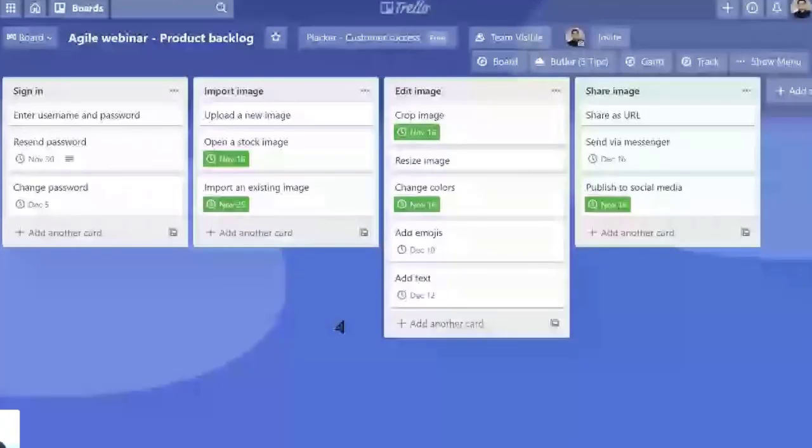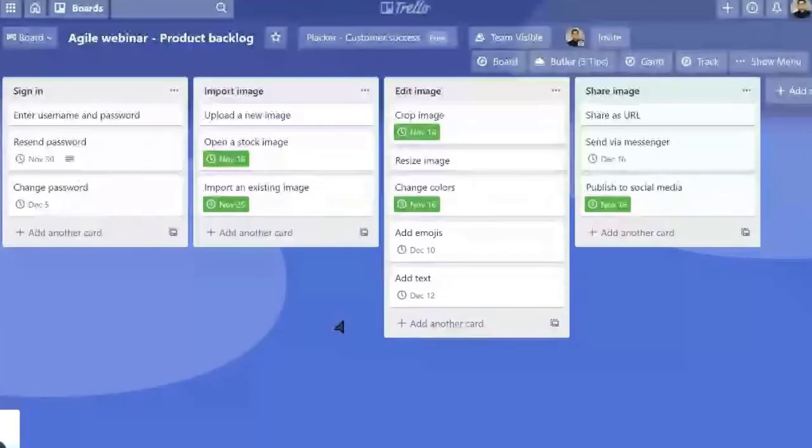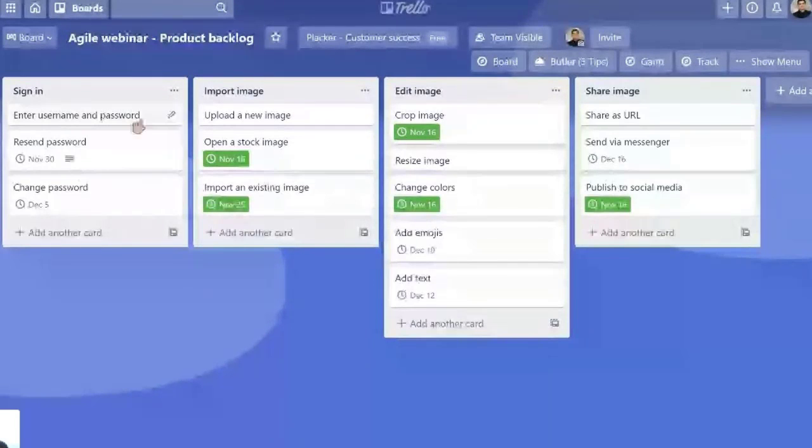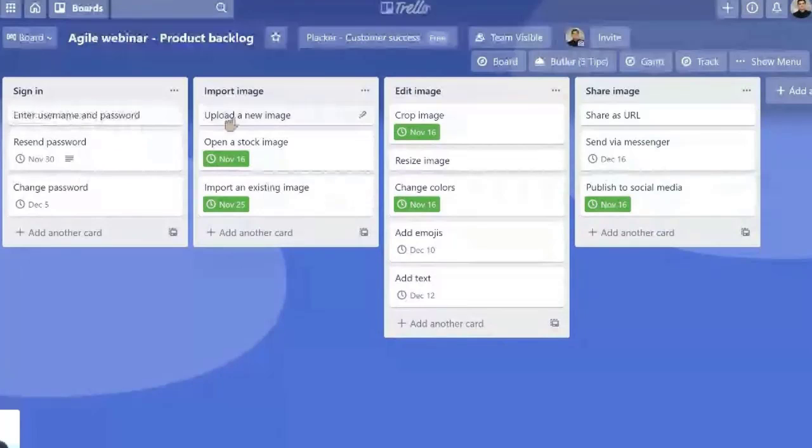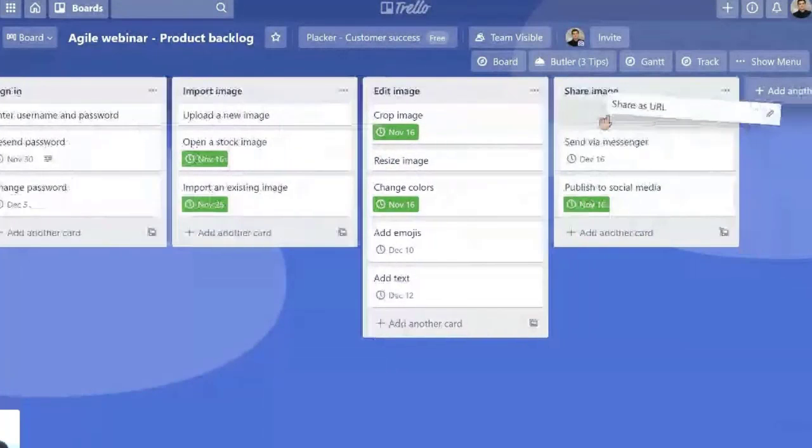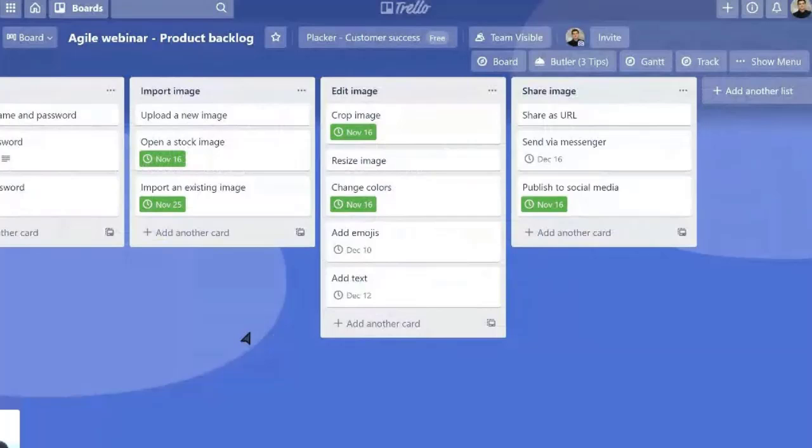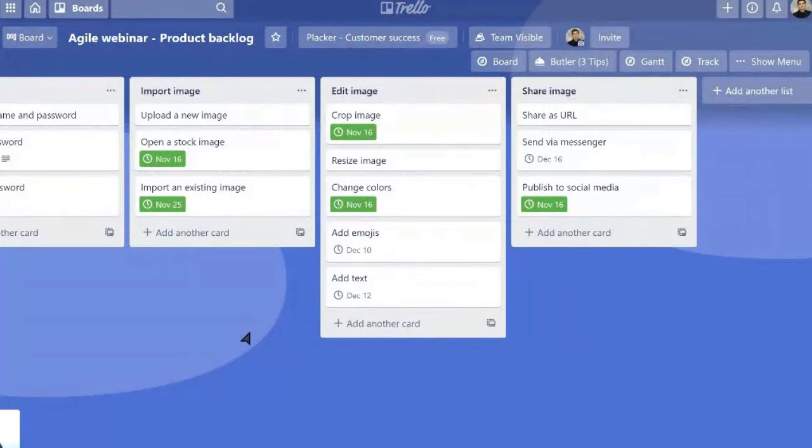But instead, when you start a Sprint, you select which cards you're going to work on. So we're starting Sprint 1. We're going to select this one, this one, this one, and that one. And that's what our team is going to focus on. When we finish Sprint 1, then we're going to start working on Sprint 2. And so it goes.